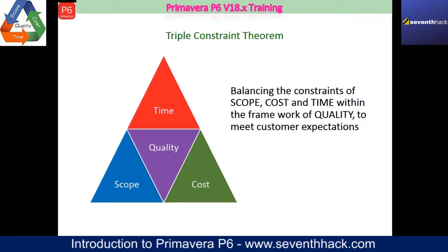You would do a rough calculation in your mind. Or what you can do, you can use Primavera to do it. Create a first level WBS, put the expected timeline. If you count backwards to today, or maybe a probable start date when you can start the project, and then you see whether the time fits into the size of the objective or whether the objective fits into the given time.